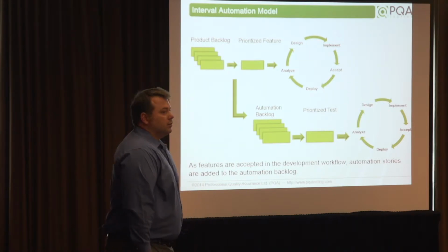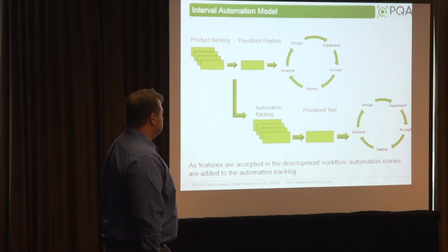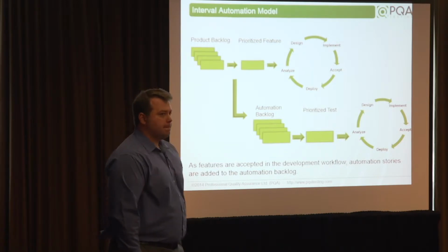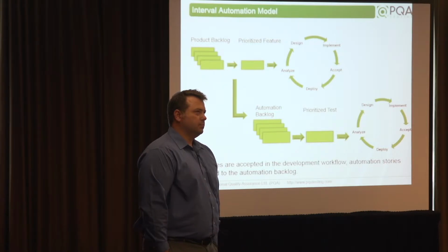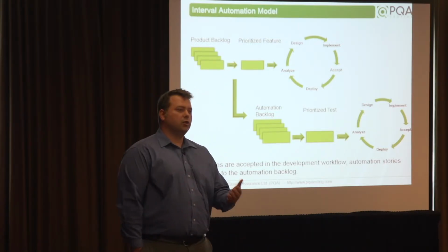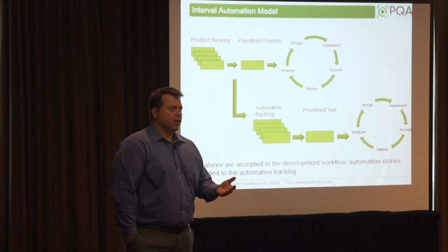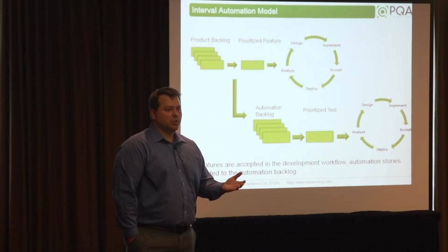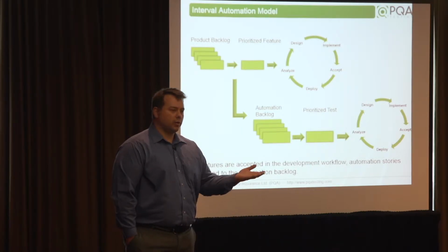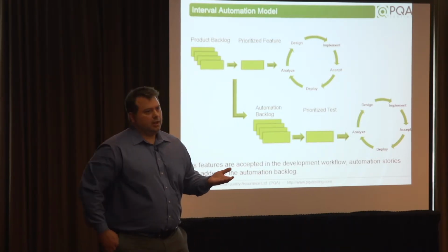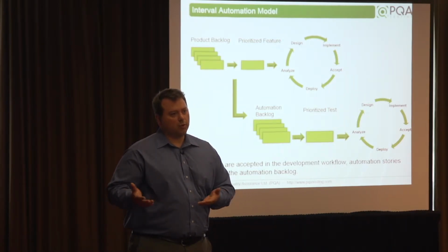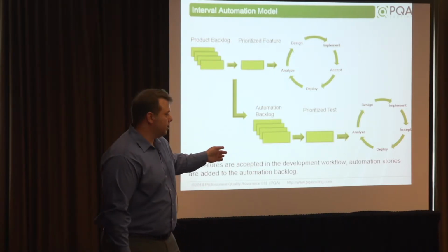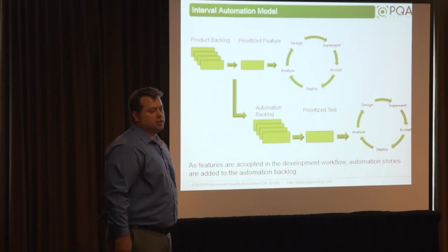There's different prioritization between feature and test, where you do manual and automation. It should be both of them, but why are you separating the prioritization? Yeah. I guess because you could end up in a situation where a story from an earlier sprint was important, but not important enough in that sprint for automation. So if you're working on high priority features in sprint 6 and some really lower priority features in sprint 7, you may want to automate more from sprint 6 than sprint 7. So it gives you the opportunity to reprioritize what's in the automation backlog.